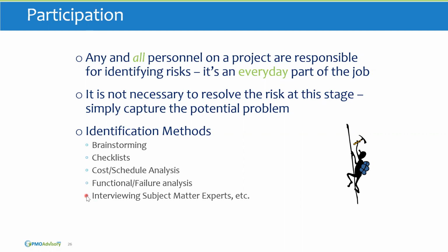And then lastly, interviewing subject matter experts. It's a good idea to have risk identification as part of every project status meeting. And at minimum, it should be a part of each project milestone evaluation. Some different risk types that we might identify include technical risks, cost risks, schedule risks, and IT security risks.